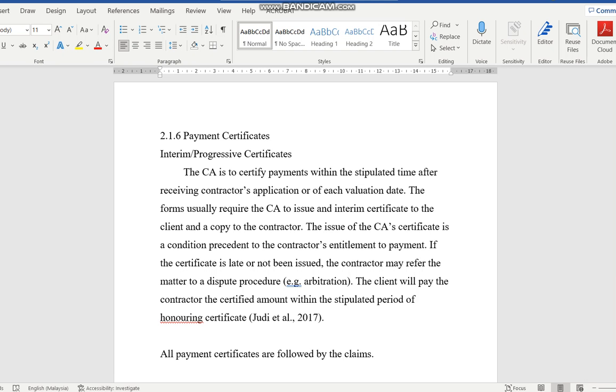In that payment certificate, it states the valuation of work as of which date, and then you have to deduct the retention sum, any performance bond, and anything like insurances or anything that is paid by the client for the contractor, in that particular interim payment. It will be deducted, even LAD, like I say. Once the amount is stated there, this is the amount that will be paid to the contractor as of this period, date the 22nd of March, for example, or 1st of April, for example.